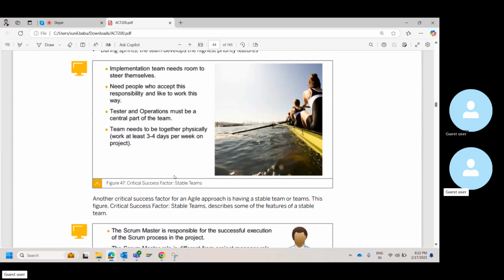That is fine. The shadow consultant will probably train and he will do the UAT with the users. That is all fine. However, the first learning that I have had at least is the person who takes the requirement, has the discussion with the business during the explore phase, should be the one who will do the configuration. This alignment you need to take for sure before you start the project.